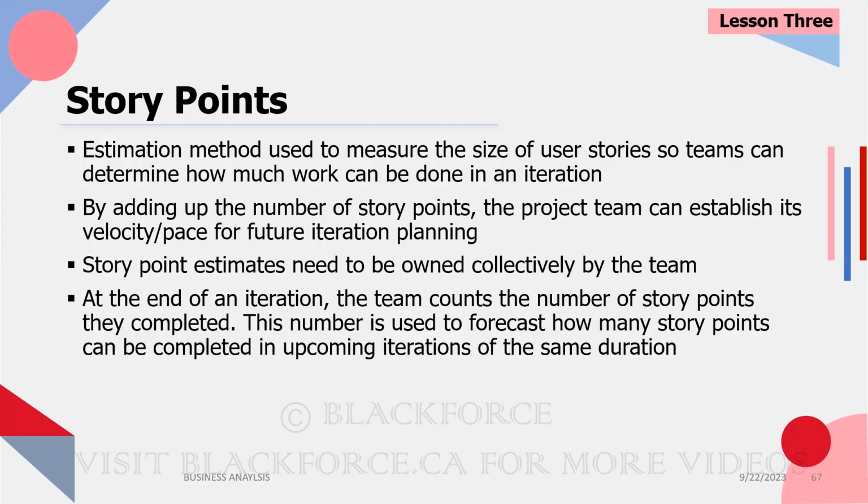A user story that has to do with calculation will be a whole lot more complicated than a user story that has to do with logging. And so that's why we try to measure the size of user stories. It will help the team determine how much work to pull into a sprint. So they might have pulled 5 user stories into sprint 1, but because of the size of the rest of the stories, they may pull just 2 into sprint 2, because the size of those 2 combined is even more than the size of the 5 they did in the other sprint. Okay? So I hope everyone is following.